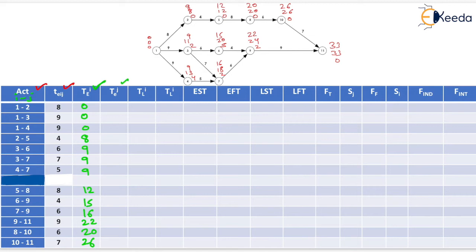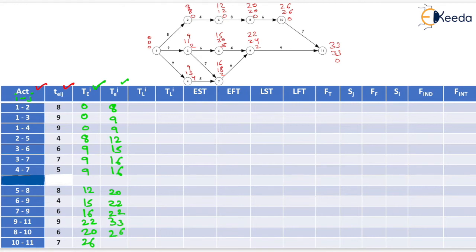Now we need to fill the TEJ values. TEJ for event 2 = 8, for event 3 = 9, for event 4 = 9, for event 5 = 12, for event 6 = 15, for event 7 = 16, for event 8 = 20, for event 9 = 22, for event 11 = 33, for event 10 = 26. We have now filled the TEI and TEJ values.